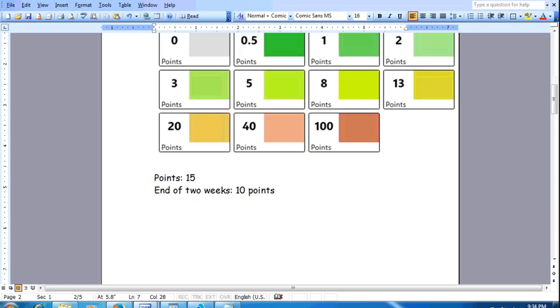You couldn't complete them fully. For each story, you're going to come up with different tasks, right? Say, first understand the requirements. A user story contains different tasks. We're going to talk about how we schedule the tasks later. Say, understand the requirements, prepare test cases, run test cases, and create defects. Those are the different tasks under each user story from the tester perspective. So you started working on the sprint, but you couldn't accomplish some of the tasks assigned to that user story. That means you accomplished only 10 points, and there are 5 points left. Something needs to be done on those two use cases, so those 5 points will carry forward to the next sprint.